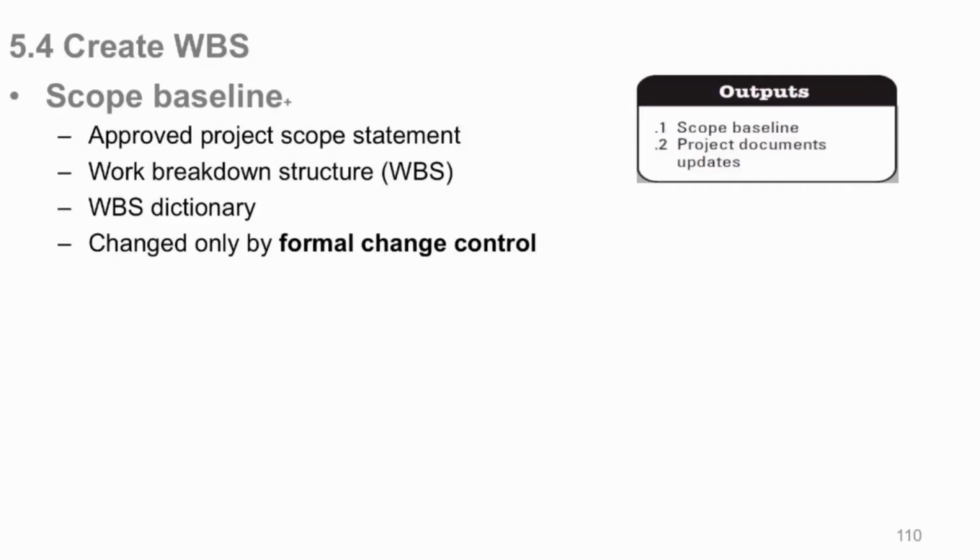But once that stuff starts advancing more toward you, you're going to have to detail it out better, and you will then need change control to update your WBS dictionary with the actual resource requirements and costs and so on. Why? Because your dictionary is part of your scope baseline. What does that mean? Well, your baseline, and what does that mean? You can't change it without change control. So whenever you start to refine stuff out there, you got to have change control to approve it. So always in there, always integrated change control. Especially your baseline is very critical.